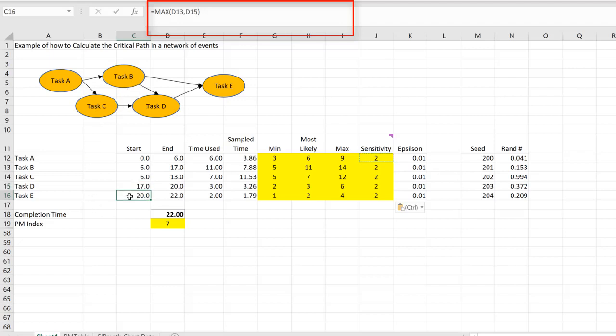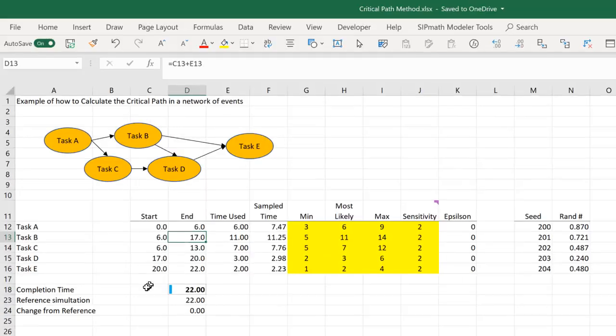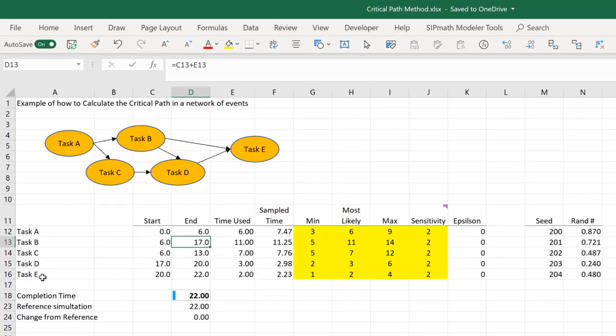And task E starts at the maximum of tasks B and D. So task E completes after 22 days.